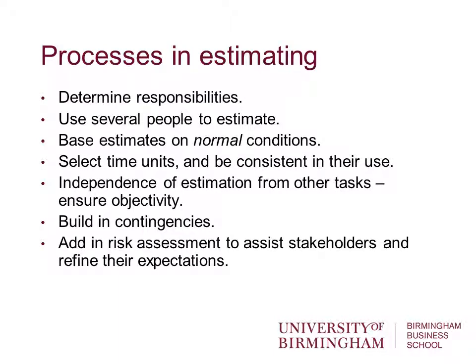So the processes are: determine the responsibilities. Often several people are drawn upon, maybe even several representatives from different organisations, to help establish estimates. The estimates are based on normal conditions, so assuming consistent inflation and assuming no major political upheavals or anything like that. We need to select time units and be consistent with them. So if you can base your planning on a weekly basis, then you stick to weeks no matter how long the project is. If it's monthly, then you stick to months.